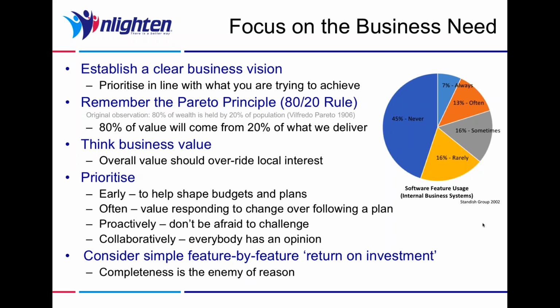So we need to think business value, and the overall value of the product or the solution that's being created for the business should override local interest. What I mean by that is that often in projects we have lots of different stakeholders, all of whom think that their requirements, their needs are the most important needs that the project has. The reality is that's not true. The overall value to the business as a whole should be the dictating factor around the prioritization of requirements and